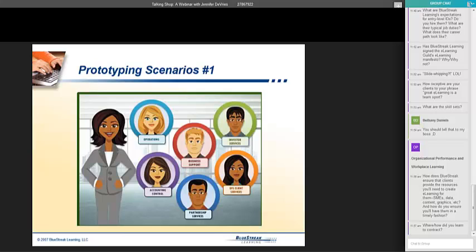How do you ensure? You can't. We tell them when we need it. We have a schedule. We send them the storyboard. We say we need your response by a certain date. We're actually starting to build a project restart fee into our contracts, which is kind of a new idea, where we are going to charge them if it's been more than 60 days since we gave them a deliverable to review and they haven't gotten back to us. So hopefully that answers your question.